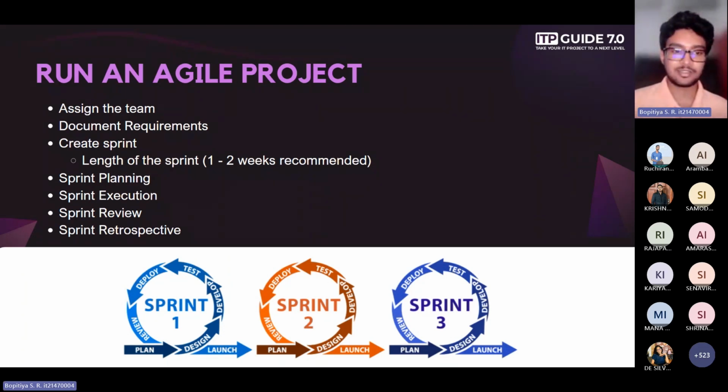I mean, it's better if you can do it. And the last item is also optional. It's the sprint retrospective, which happens after the sprint review, also at the end of the sprint, where you look back at the sprint at what went wrong, what went correctly, and areas that you could improve within the sprint. So those are really optional things. You can take a look at this later as well. I just gave a quick run through on